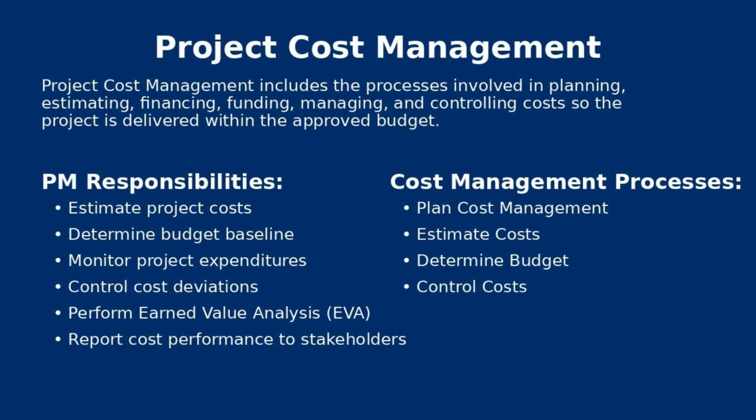Project cost refers to cost of all the activities related to the project, cost of all the resources required to complete them. When I say project cost, it refers to material, labor. It will include the cost related to project management activities. It will include the cost related to all the risk efforts that you have taken. It will include costs related to quality efforts. You need to pay salaries for resources. There are additional costs like office administration expenses. You need to train the resources. There's a training cost involved.